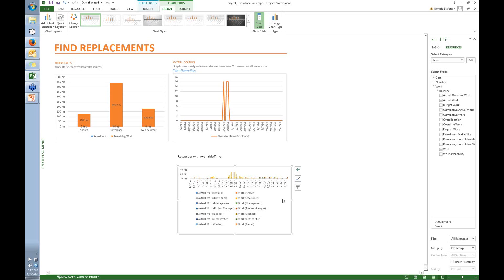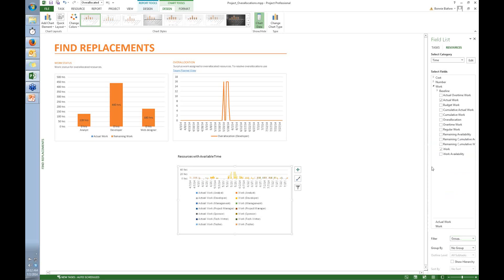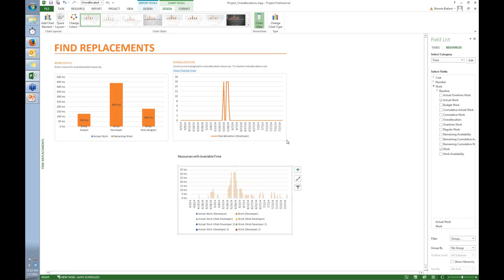The next thing I want to do is to find replacements for the developer, I'm going to look for resources that are in the same resource group. So back over to the right side, I'm going to apply a filter, click the down arrow, and choose Group. And I have a group called Dev. So I type that in and click OK. And now you can see that the only resources considered for this chart are the resources in the Dev group.